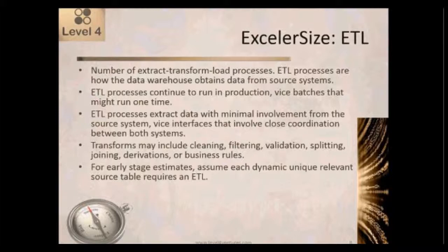And really, you could probably get away with that perhaps as low as 15. But if you're only going to have 3 or 4 ETLs, you're going to have somebody help you figure out are they likely to be complex or simple. But for early stage estimates, you're probably not going to know how many ETLs there are. But what you will probably know is have some indication of how many source tables are going to be feeding into the data warehouse. And so you'll be able to, from there, say that, well, let's assume that there's 1 ETL per source table.